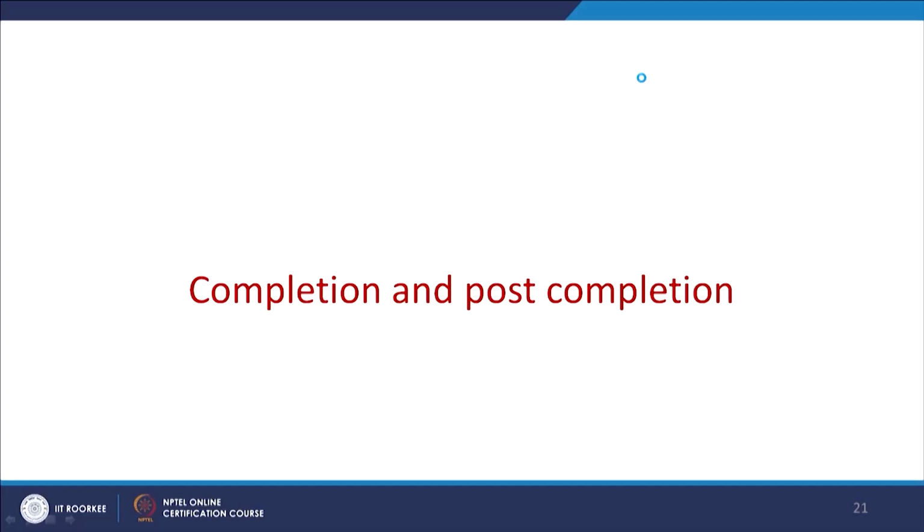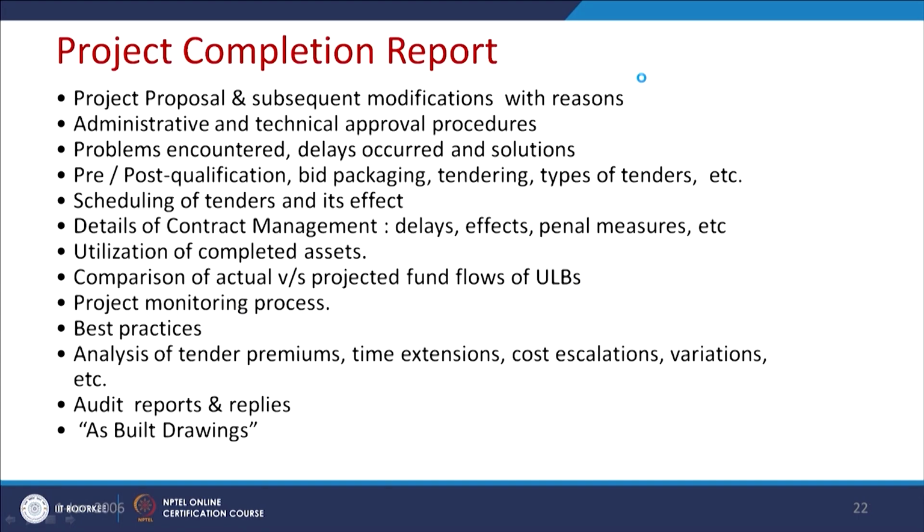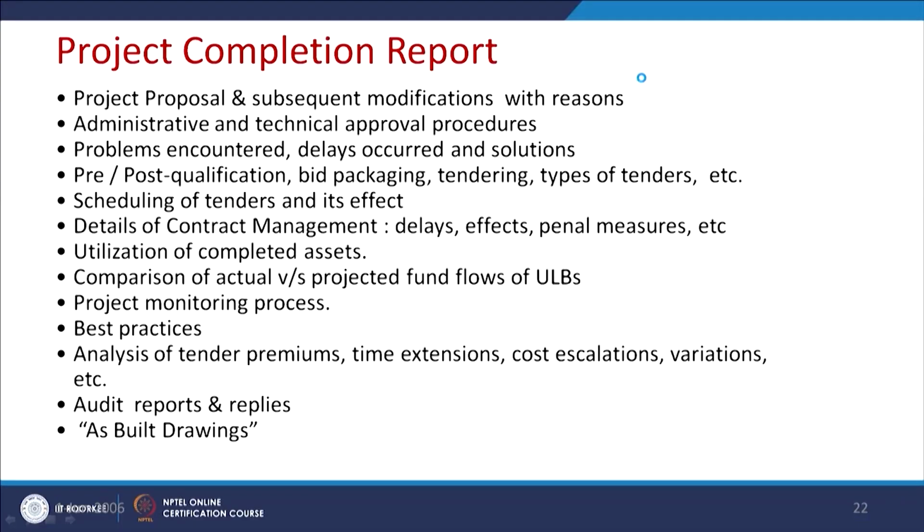Now, in the completion and the post completion period, when you complete the project, basically we make a project completion report so that it becomes a complete document which will help the future city managers to execute similar projects, and also to refer to this document if any clarification, any references are required for that particular project. So, just have a look at what the contents of the project completion report are.